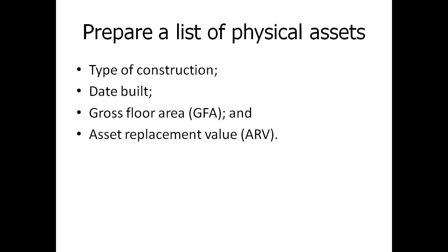Before commencing the audit, we need to do some homework on the building itself and really understand what is the building, the basics, the basic data of the building. That is the type of construction, whether it's concrete tilt-up, whether it's brick with a tin roof, the date it was built. That will give us a good indication already, as I said earlier, on whether there's likely to be legislative issues that might come into play. Access to premises, fire protection, those type of things.